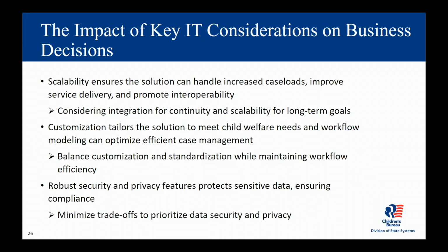So that is key. And again, I'm reiterating this, finding the right balance with customization and standardization is essential. Why? Because the customized solution can offer quite a number of advantages by addressing the very specific needs the business has. But when you go for excessive customization, the immediate outcome would be the higher cost and maintenance complexity. So there is indirect impact could be like lock-in, vendor lock-in, or you may not be able to scale it the way you want it to be. And then user adoption could be very well impacted as well.